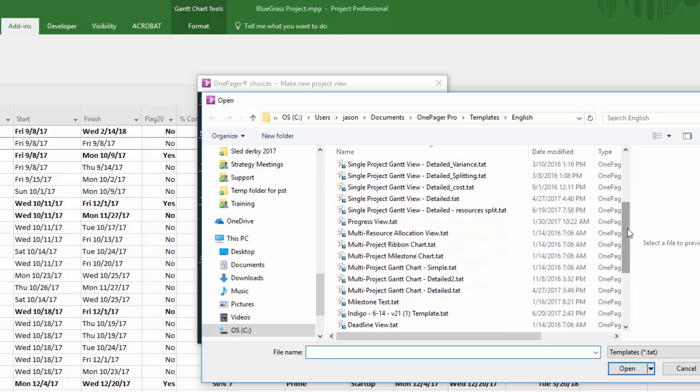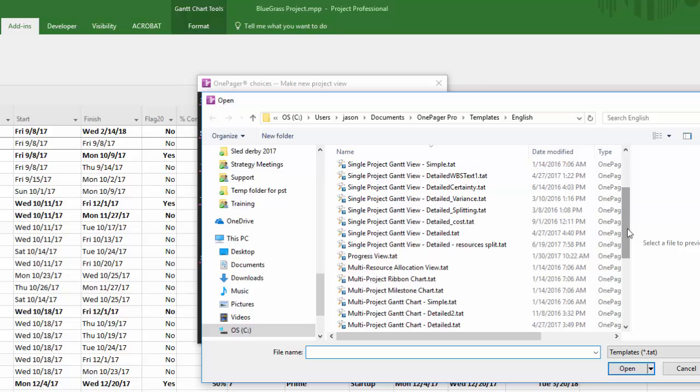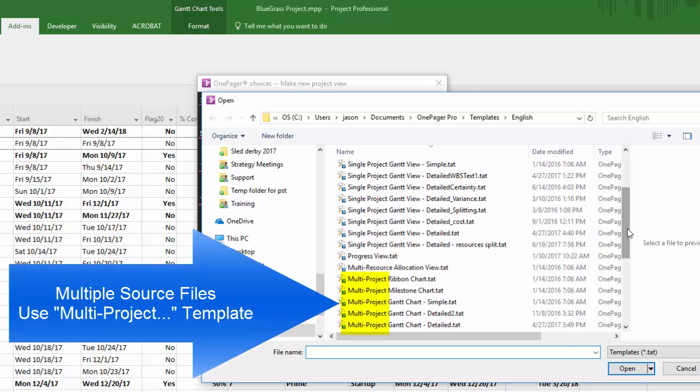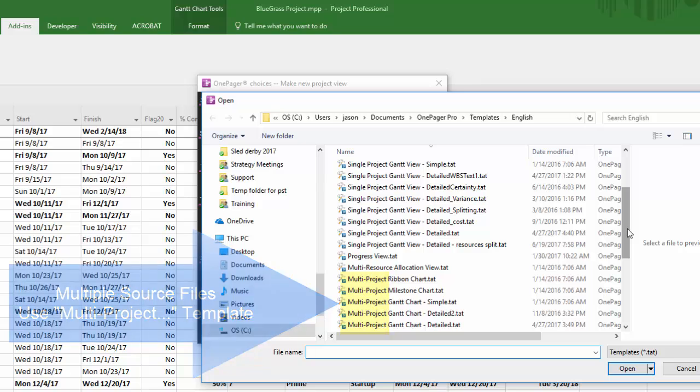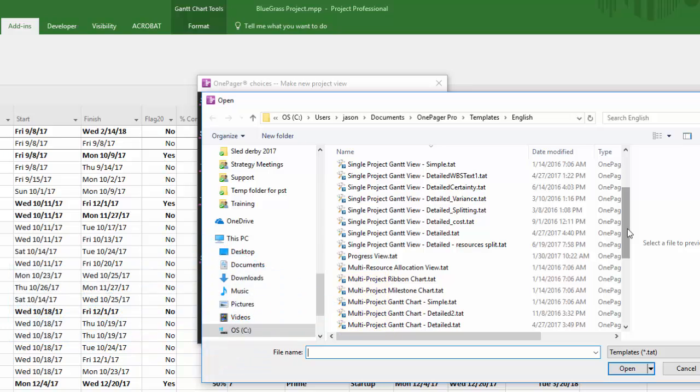The base templates are mildly descriptive and I have two pieces of advice for you here as you consider which one will work best for you. If you are creating a OnePager using data from multiple source files, use a template that says multi-project in the name. There is a particular setting in these templates that will allow OnePager to uniquely recognize data as coming from separate files.